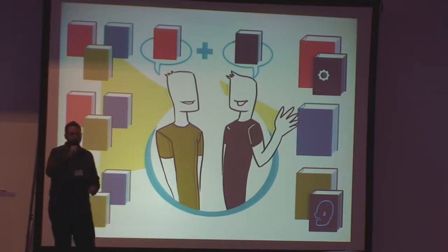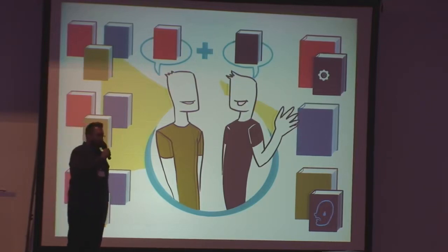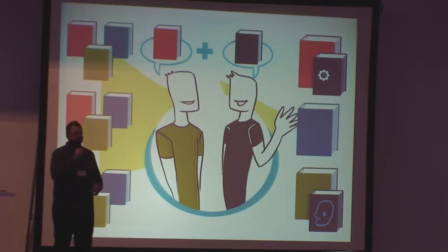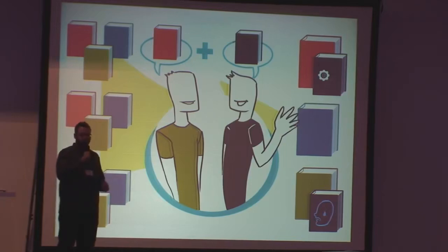So in terms of what the security implications of these stories were and what the outcome of that conversation was, certain stories we would identify as, okay, this needs some security attention, and typically we would track that. This was new, that we were starting to actually track security work that needed to be done at all. But typically we were tracking it at the level of, you need to get security sign-off before this is considered complete. We weren't tracking anything in much more detail than that.